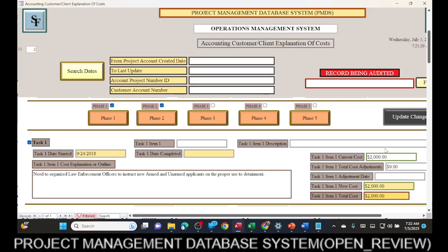if the project's going to be in the city or outside the city, who I will be utilizing as an outside resource, how much they're charging us to contract them, the terms of their contract, how long the process is going to be, how much we're going to pay them an hour, what their salary is going to be, how long we're going to contract them for, if there's going to be a flight involved, how much, hotel stay, food, all these factors will be taken into consideration, okay, to give them an overall cost of what we're going to be presenting to them, okay.